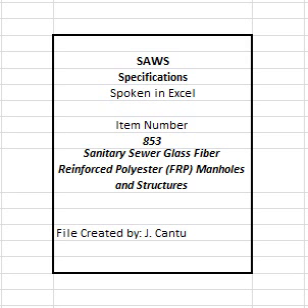milestones. A. Milestone 1, 40% of LS, manhole and structure setting to include for each such manhole and structure, excavation, compaction, setting manhole and structure base setting to include concrete base encasement with reinforcements, saw cutting of surfaces as required and connection of new or existing sewer pipes to the manhole and structure as described in this specification.